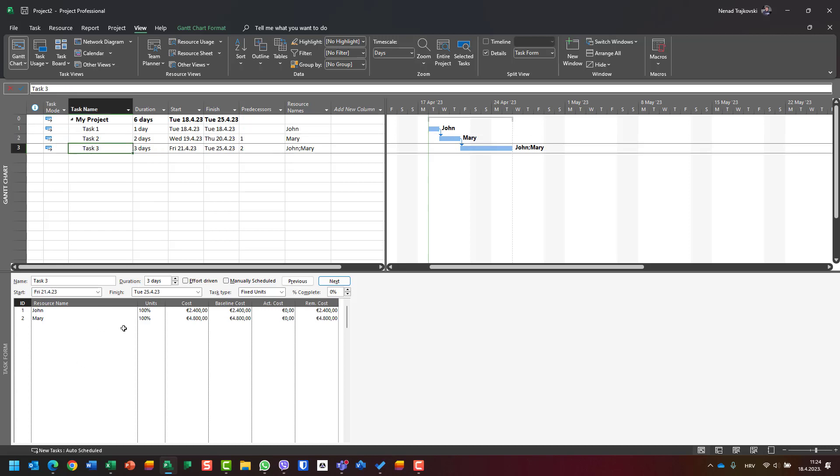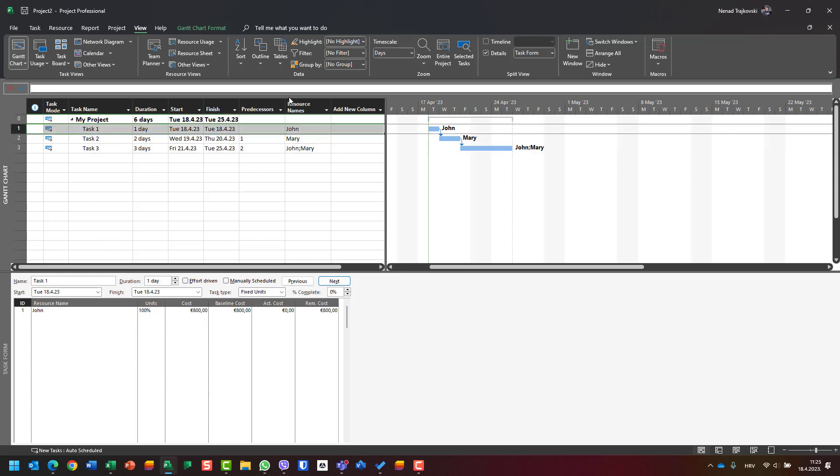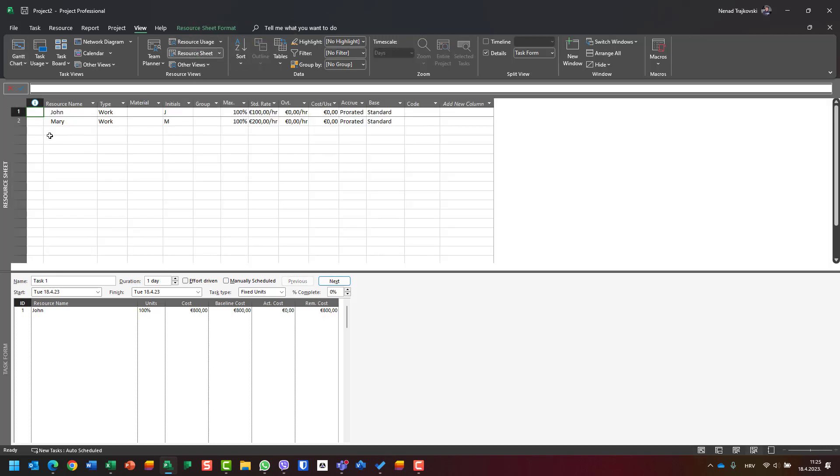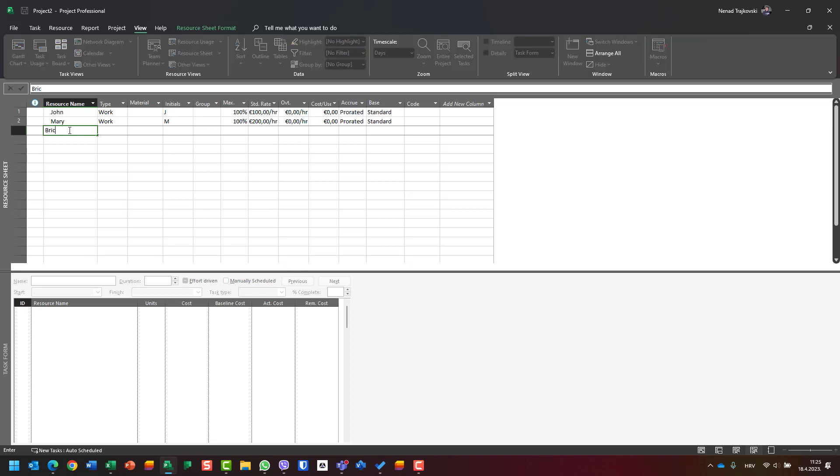Here, because John is the only assignee, those costs are the total cost. But for John and Mary together, or if you have Peter and Paula and material costs, you don't see total costs easily. Let's add some material cost - let's say bricks. It's a material that costs 10,000 per piece.